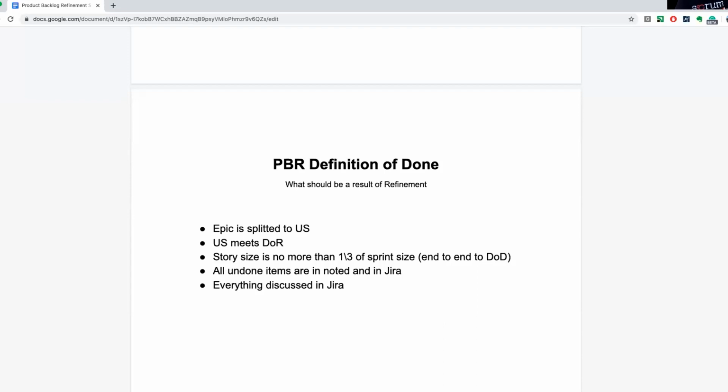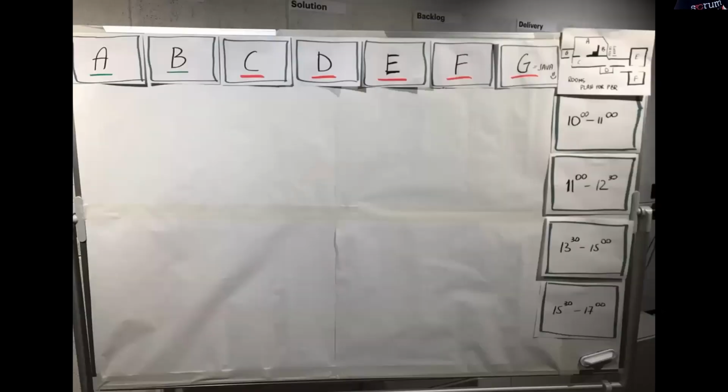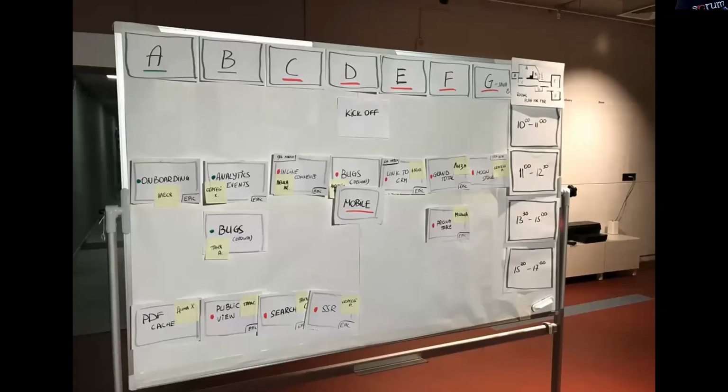So we made the open space for this, and you can easily replicate the open space in Miro by giving the room in, for example, Zoom or Google Hangout or wherever you discuss. We moved everything to one board, and there were different types of elements we refined: the features, the technical elements, and the defects. We also reviewed a lot of the defects in a special refinement session for defects review.